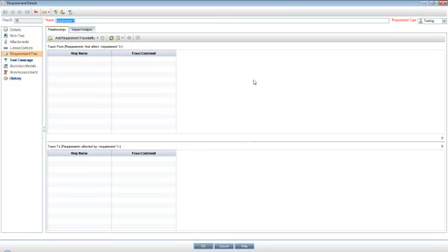as you're stating here in the question, legal and operations requirements, if I'm not mistaken. So you have a legal requirement, which will be linked to an operations requirement. If you change the legal requirement, then the operations requirement that it is linked to will receive an automatic notification that the legal one has changed, and you need to update and modify, and so on and so forth. So this linking in between them is very possible, and you need to use the requirements traceability function in there. Okay, hope that answers your question.